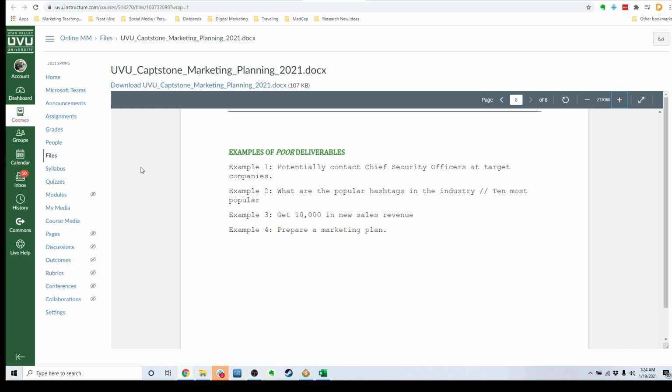Number 3, get $10,000 in new sales revenue. This goes back to my concern that making sure that your deliverables are something that you as a group can achieve. Very rarely do I have companies that have just asked me for my students to go out and sell for them. This is kind of a marketing management class. So in this case, you might be generating leads and opportunities, but you don't have the ability or responsibility to close those leads. Therefore, you can't be directly responsible for the actual revenue brought in during the semester. Therefore, this is not a good task because it's something that you would be held accountable for that you can't be responsible for.